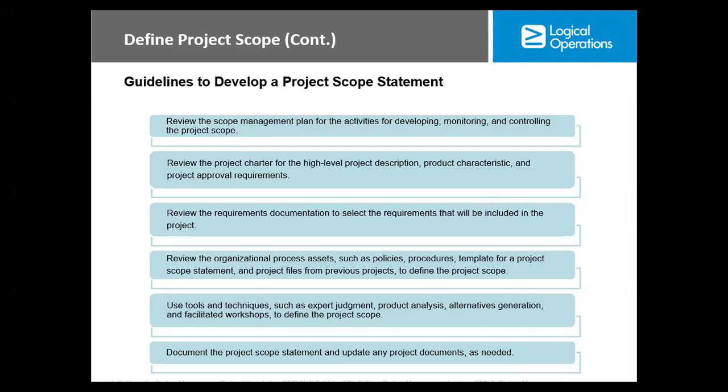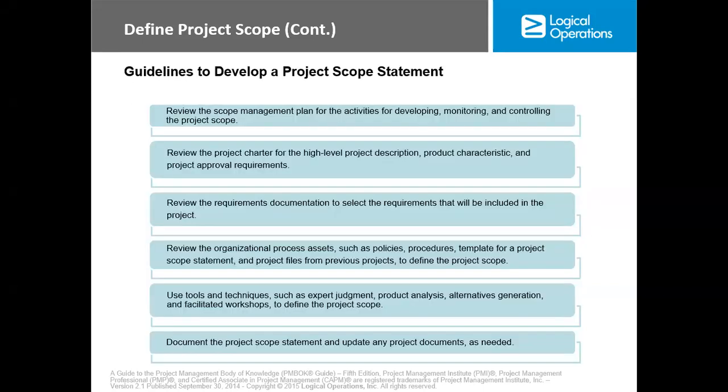statement. Now, after the project scope statement is developed, we now create what we refer to as the work breakdown structure and the work breakdown structure dictionary. The three of these items will help us to determine in total what the scope is. Anything that is not found in any of these, that is the scope statement, the WBS and the WBS dictionary, is not part of the scope.